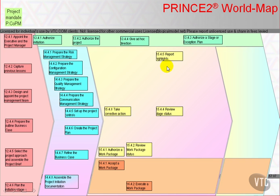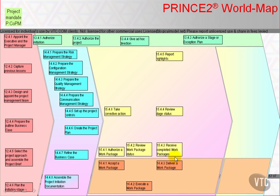Combine them and report upwards to report highlights, and take actions from them for minor corrective actions which amend or authorise further work packages. The team member's activity results in delivering a work package, and notification is passed such that the project manager receives completed work packages — although note that's not necessarily receiving the results of the work package, as they're typically handed on to whoever is best placed to use them.